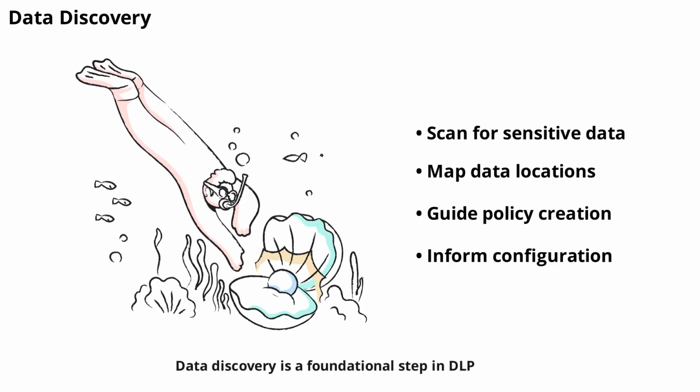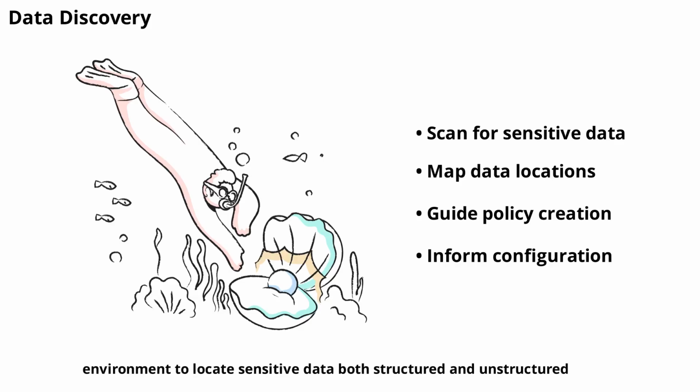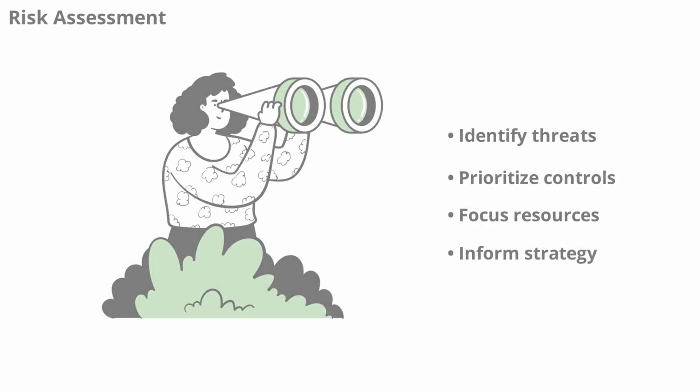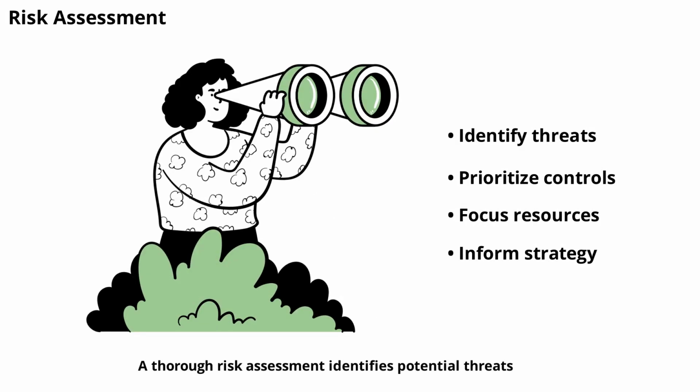Data discovery is a foundational step in DLP. This process involves scanning your environment to locate sensitive data, both structured and unstructured. Data discovery can take 2 to 4 weeks and helps you understand where your most valuable information resides, guiding policy development and tool configuration.